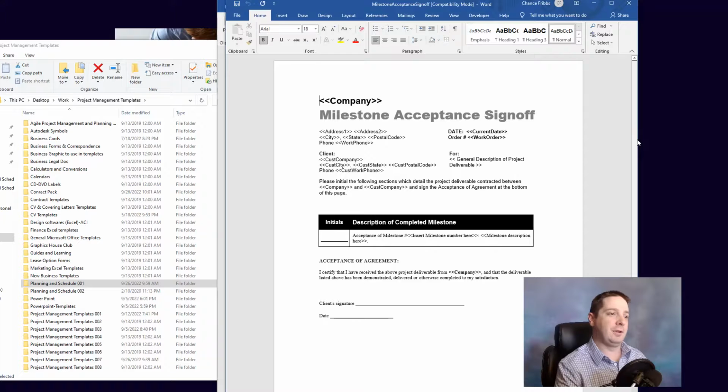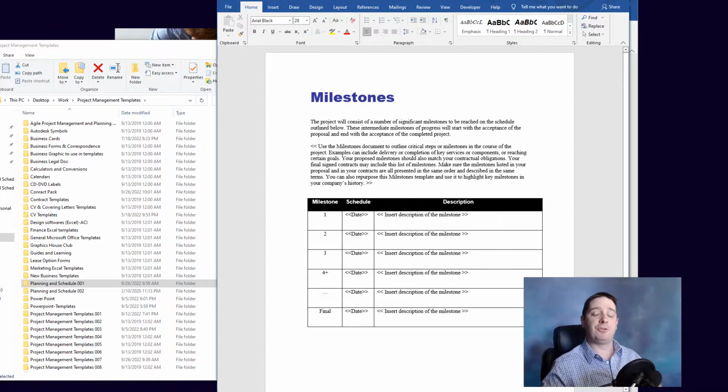If you agree to this, again, fill all this information out beforehand. But initial here of the acceptance of all these different milestones, or you could have all the milestones in this one bracket, or you can expand this out to all the different milestone sets, and have them initial, have them sign, and put in a date. That way, it hard locks not only you, but it hard locks them into not having scope creep. I've talked about this before. Scope creep is a project killer. And so when you set milestones and you get a sign off,